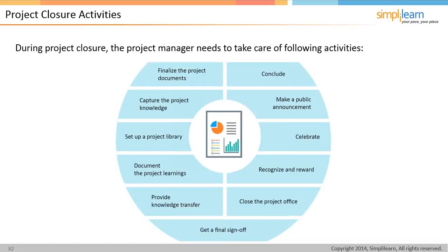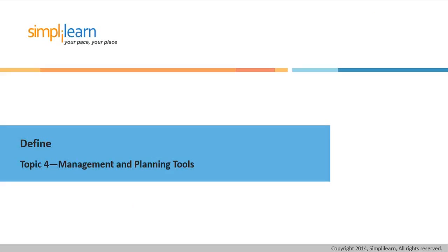So instead of taking 5 or 6 months, maybe they can cut the cycle time for the project down to 3 or 4 months because they can follow our roadmap. That's maybe one of the most valuable aspects of keeping a repository. It's not just to keep a history of stuff you've done, a bunch of documents that no one looks at. It's to learn from what others have done before you.